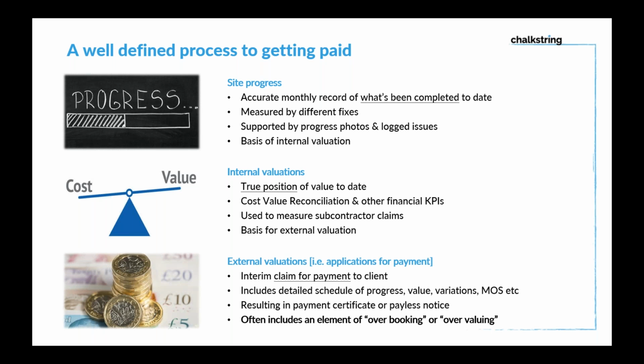So on the external valuation or application for payment, and obviously a lot of this terminology we all know is very interchangeable. This clearly is an interim payment request to your client to get payment made for that month's work, and clearly it has to include a lot of detail to substantiate it all. So a detailed breakdown of work done, value, all the variations you've been instructed, materials on site if relevant, all that sort of thing. And obviously that then turns into either a payment certificate or a pay less notice, depending on your client.